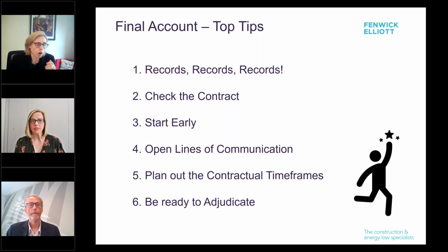Yeah, so option F is the management contract, and I think the key thing there is it's subcontractor cost plus fee. So you need to be making sure that your subcontractor costs are properly evidenced. The rules on disallowed costs with subcontractor costs and defined costs are fairly similar to the option C ones, essentially, and option E. But the golden rule is, evidence that money should have been paid, obey the rules in your contract and provide the documents. And quite often with those sorts of contracts, people want to see the accounts evidence that payment has actually been made.